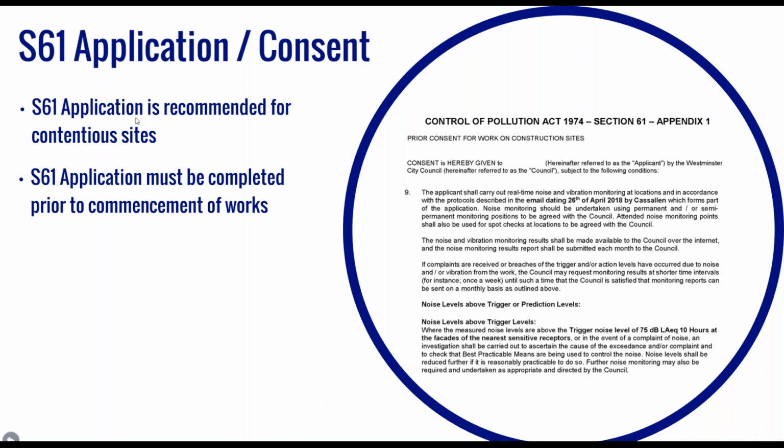typically in conjunction with their acoustics consultant, to provide more detailed information on the works and the method by which they'll be carried out, and measures to minimise emissions resulting from the works. So again, the example condition that we've shown on the screen sets out a number of requirements that the developer and contractor must follow as part of the Section 61 consent.